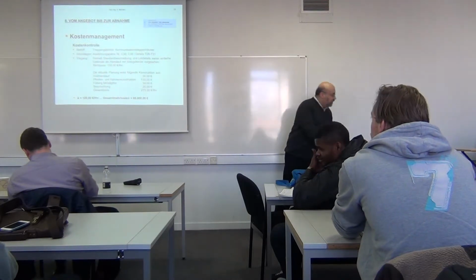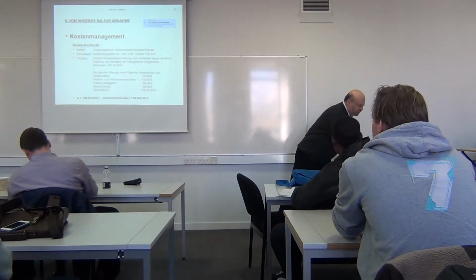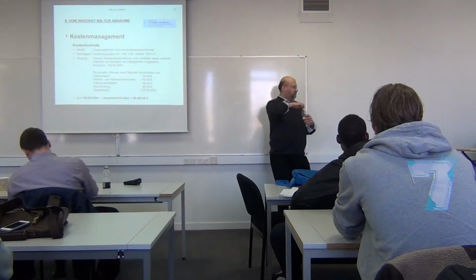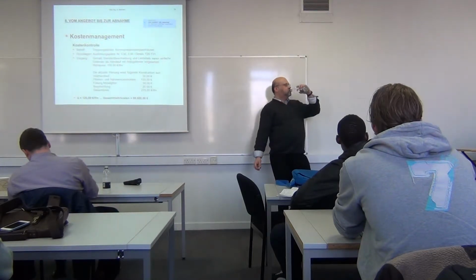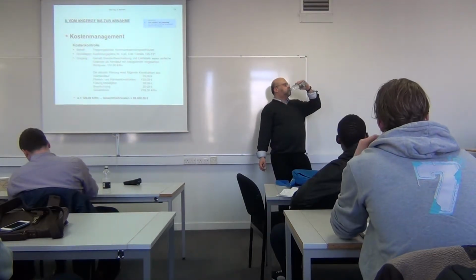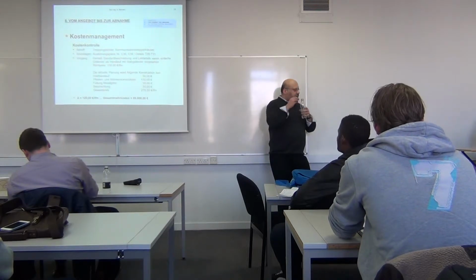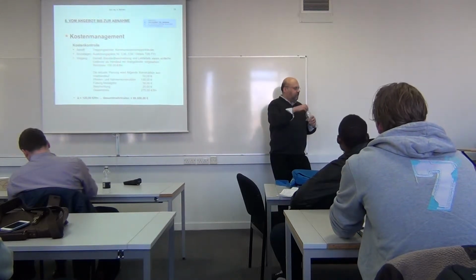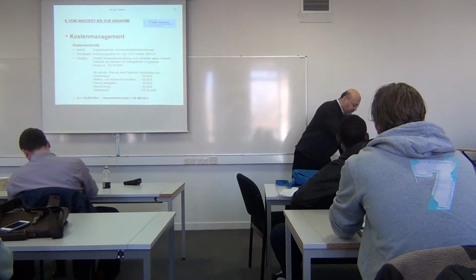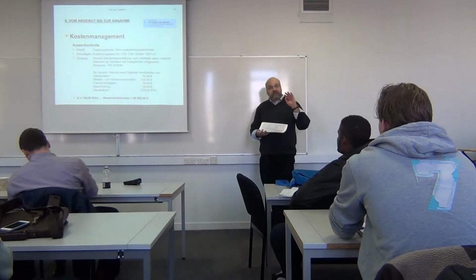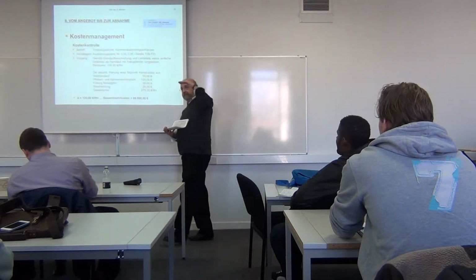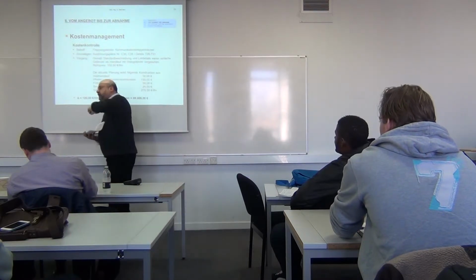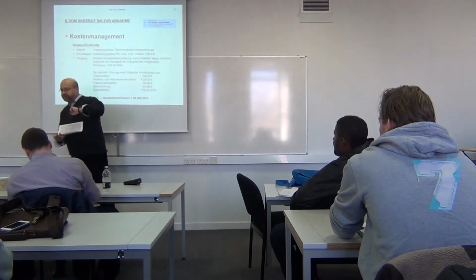It's a classical comparison of estimated spend and where you are in reality. Plotted, literally, how much you have spent and how much you should have spent by that point. Also how much you should have spent as a maximum, and how much you really are going to spend.